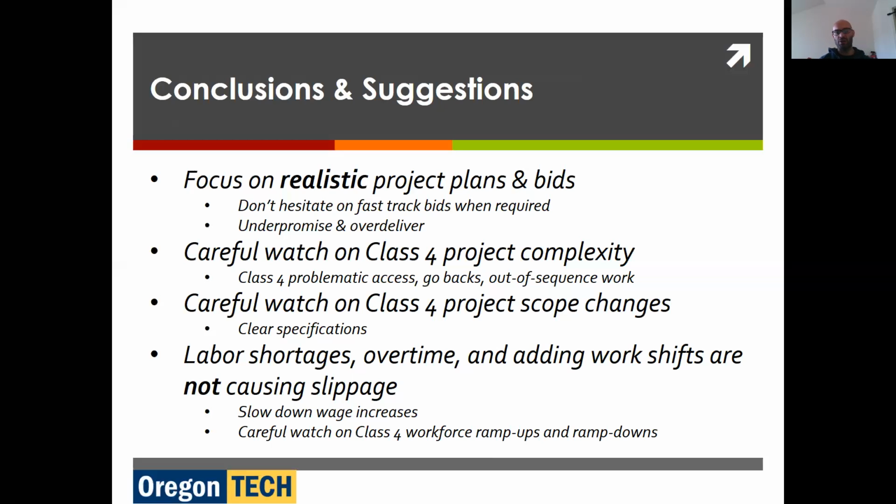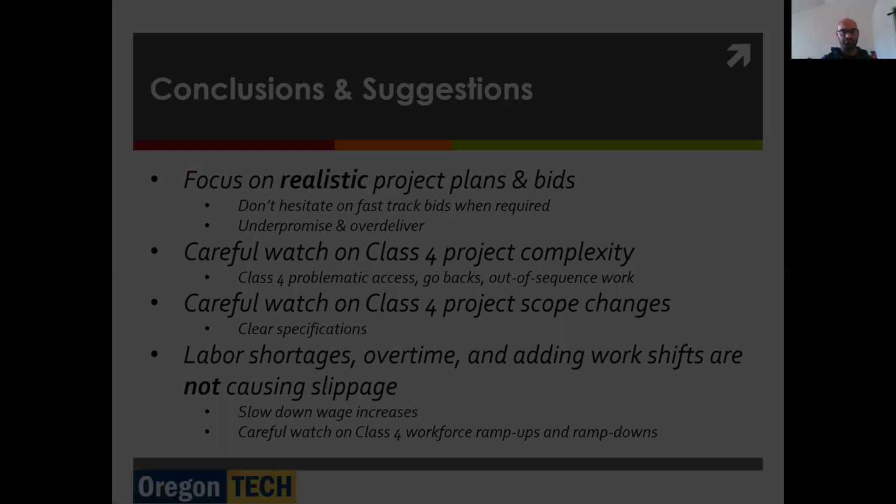We should put a careful watch on class 4 workforce ramp ups and ramp downs. This goes back to realistic bids and complexity that can abuse our workforce. Big changes in workforce numbers, ramp ups and ramp downs, are causing more slippage.